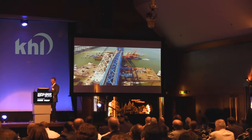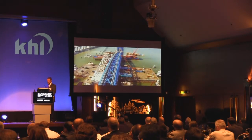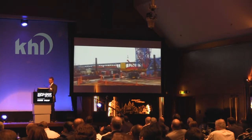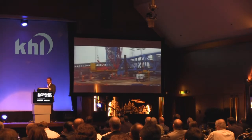Removal of the barge allowed the joint venture access to continue their operations in preparing the new bridge for commission and preparing the Basque Bridge for removal. It also allowed the Basque Bridge to be lowered and rail traffic to resume. Within minutes of Burkhalter's timely exit from the channel, scheduled rail traffic was once again crossing the old Basque Bridge. Rail transit had resumed, and the new lift span bridge was in place, but the job was not yet complete. The existing Basque Bridge still had to be removed from the site.